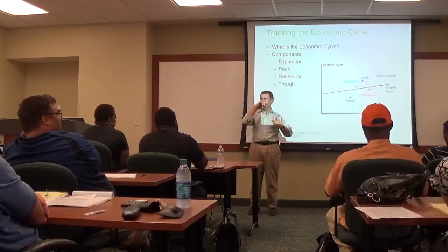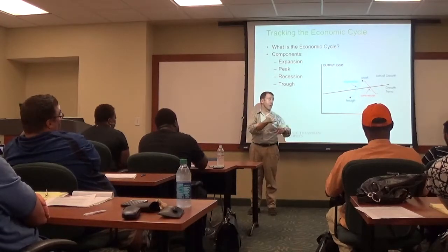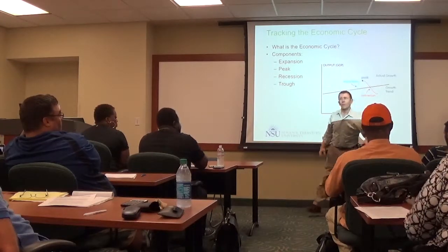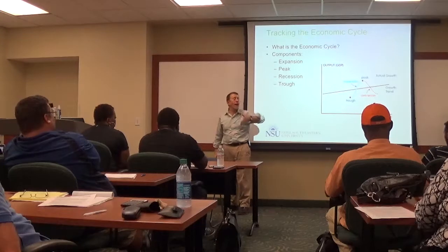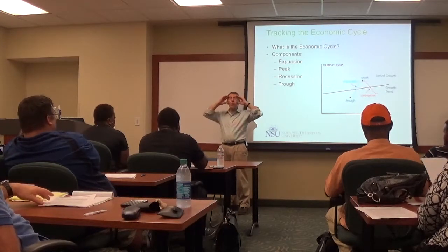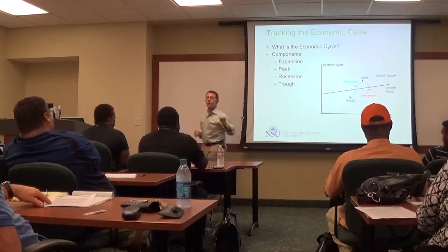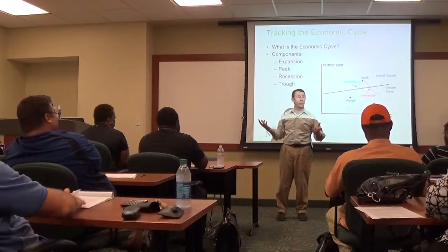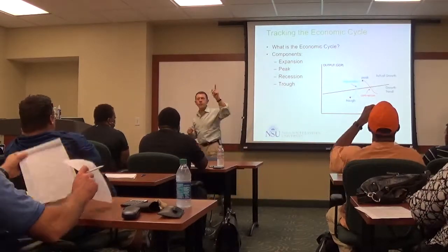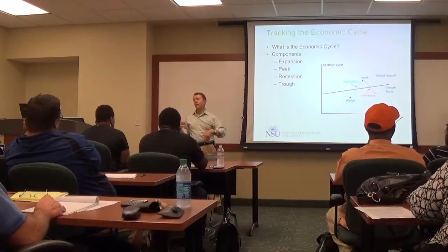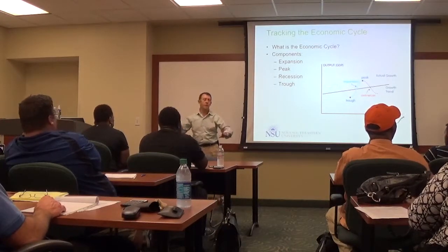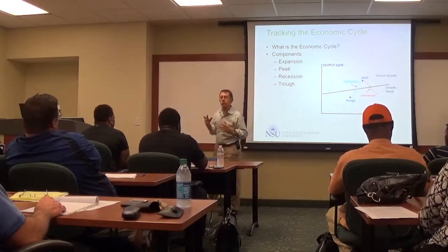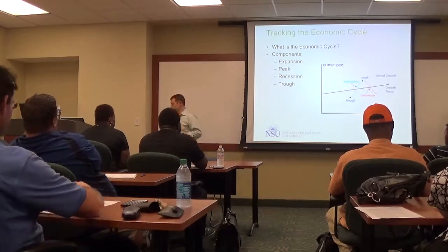The project I worked on, I think I mentioned to you, in Rockville, Maryland, I started my project. Chad, when did I start that project? 1991. Good for you, very good. And it's still finishing up now. All right, so that's, oh my God, too many years, right? And so 1991 to 1996 was the zoning and the entitlements. That's 5 years. And then we started building and we got the theater and everything else done, but from 96 through, it basically stopped in 99 and then only restarted in 2011, 2012. Now they're finishing up with the office building and a few other things.